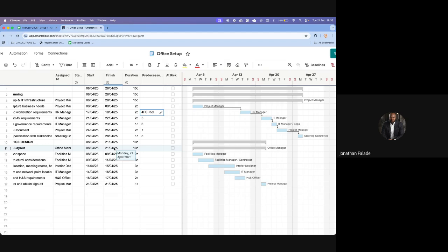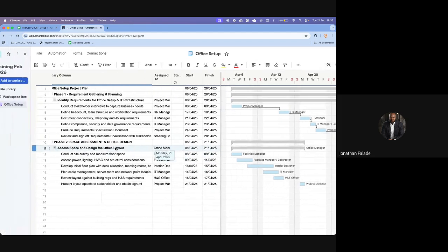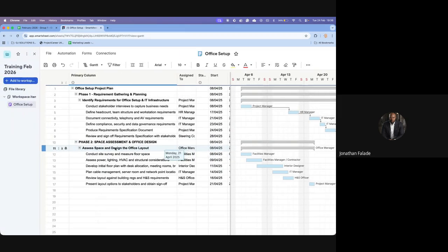Because what you don't want is to be doing something, it's done, and then somebody in your resource now says, oh, I've done it, but now I need X, Y, X, Y. And it's like, well, that X, Y, X, Y, we could have been doing that since, or we could have put that order in if we know there's a lead time. So you really have to be good at asking questions. You understand? That's the best way I can put it when it comes to yourselves leading this as PMs, right?